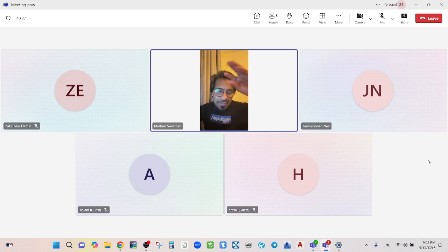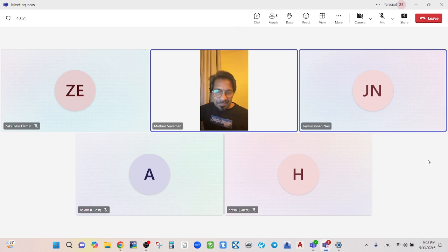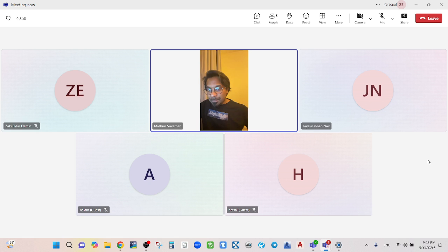So Jayesh, now you draft a format. You tell them this is the contract, and if Midun fails, immediately within 1 hour I need money. If I request it, within 1 hour I need to get the money, with no obligation. Whatever you want, you write in that format and give it to the bank. The bank says no worries, I will give it, but you pay me this much amount. I said okay, I'll pay this much, and I get the guarantee and submit it to you.